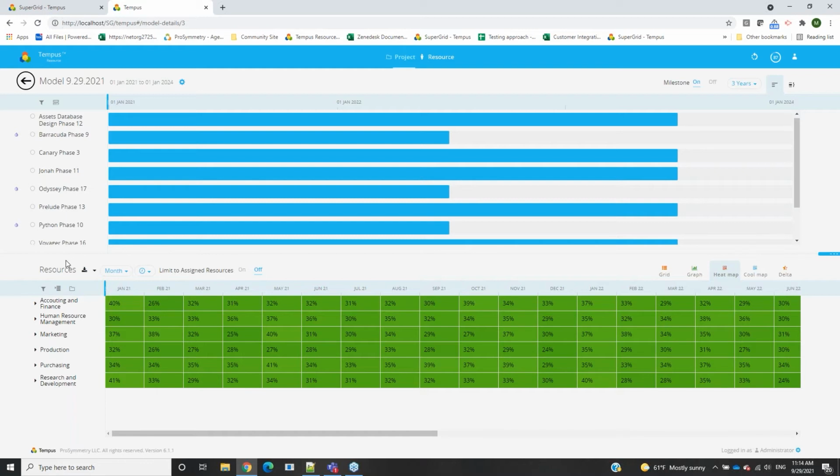But what happens when the resources that you're managing or looking into are assigned across multiple projects that don't belong to that filter that we applied? So maybe in this case, we're looking at projects in phase 1. However, what if some of the resources we're interested in are assigned to projects in phase 2 or phase 3 or phase 4, ones that have not been included in that filter? We have no visibility into that information down below. All we're seeing is current phase 1.